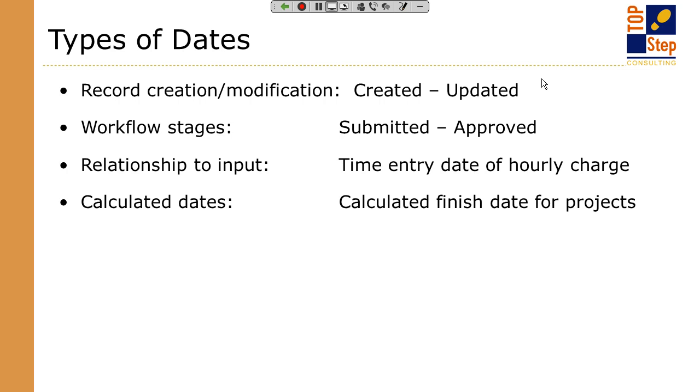However, if you put something like 80 hours on a task, 120 hours on a task, and you assign it to a person, the system will compute how long it will take to finish that task if that person is dedicated, for example, at 100%. There's a percentage of time field on the task form that allows you to control the time dedication of the person. In those situations, if you are not physically typing a start and end date in, the system is actually computing those dates for you.